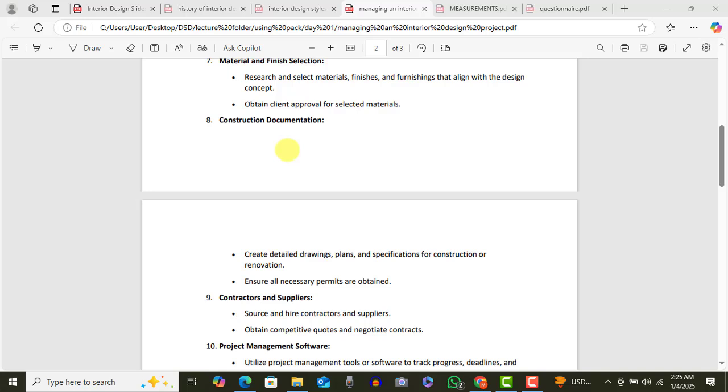It's not just that. If you go and follow these masons, they'll just tell you okay, we've got a cutter, you be cutting. There's money. There are small monies they are looking for, so they'll just say okay. Exactly. So you need to seek professional advice. Let them advise you. Okay, before we do the door, we need to put a lintel. We need to do this. If we even cut the door here, would it compromise the building? Do you get that? So the moment it involves structure, get a professional to hold the lintel before you even do that.